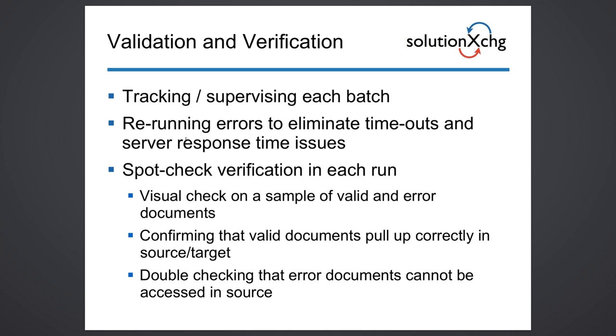And of course, risk is important. So every job is tracked, every batch is supervised. If you have a fairly short time frame, you can apply a lot of diligence. If you have a long time frame, nobody will provide the diligence, because who has the money, who has the time to babysit a project for a year and a half?